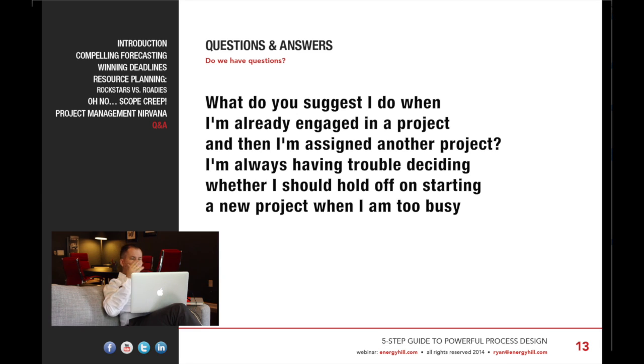So let's say you have 10 projects and 3 of them are real small, they can be executed real quickly. I go against the trend and I say try to get those done quick, and a couple reasons why. If they are so short and quick and succinct where you can execute on those projects quickly, you can get almost a rolling out projects attitude, which can help the other projects.